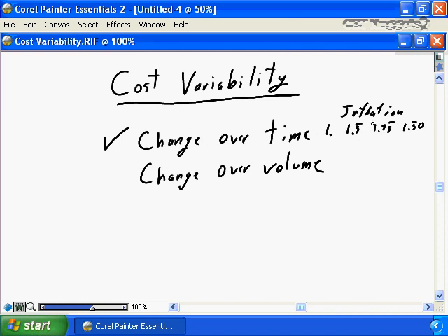A lot of materials will get expensive over time as a result of inflation. If you need to buy lumber, if you need to buy gasoline, if you need to buy most commodity products, over time, inflation is going to increase the cost, and gasoline in particular seems to inflate in cost at a great rate far higher than inflation. So how much control do you have over cost? Other components often will deflate in costs over time, and technology being a prime example of that.